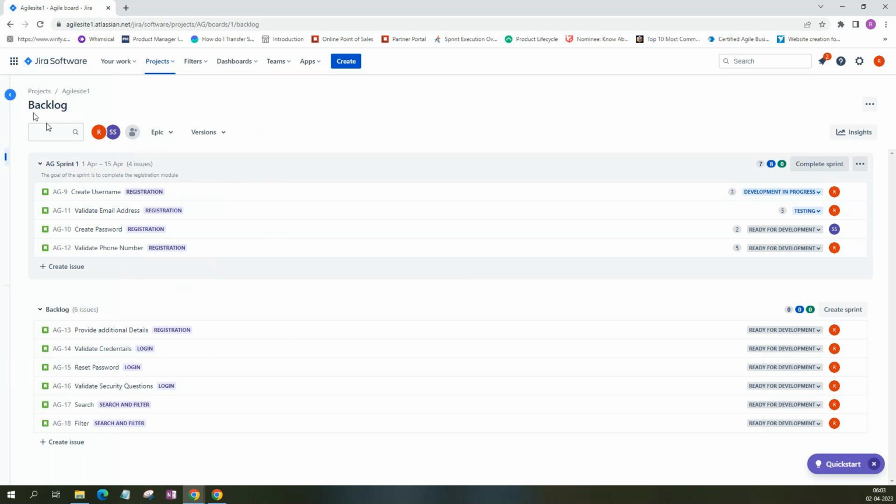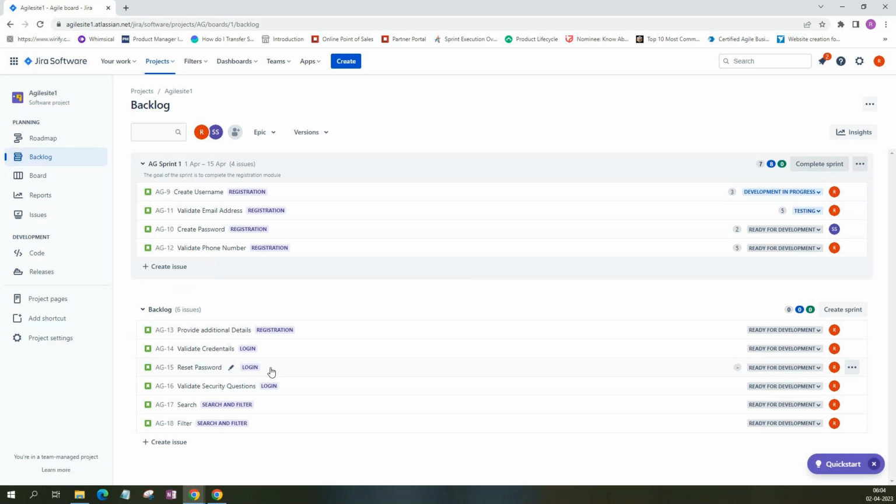So they have created a new story, is what you're saying, rather than going back or reassigning. In the Jira world, in the real world, we don't assign this back. Whoever is doing it, they will test, the QA team. If they find a defect, then they will log it as a new issue, and then they will close it and tag it to this.